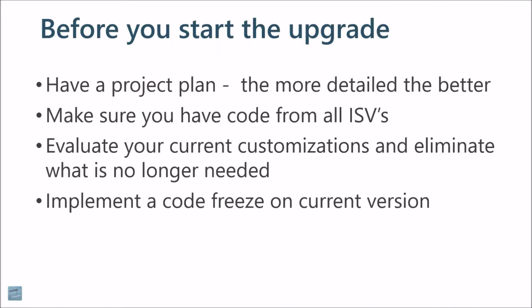The other thing that I would tell you about starting your upgrade is typically you have a date in which you're wanting to go live by, and you try to back into that date. And I know that is oftentimes just the way things work. But what I would tell you is that it is good to look at all of the tasks that you have and to try to base that date on the amount of work that you have ahead of you.